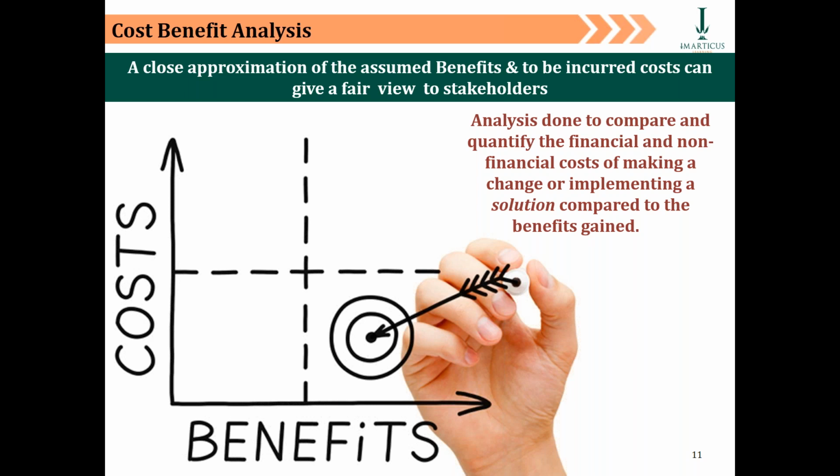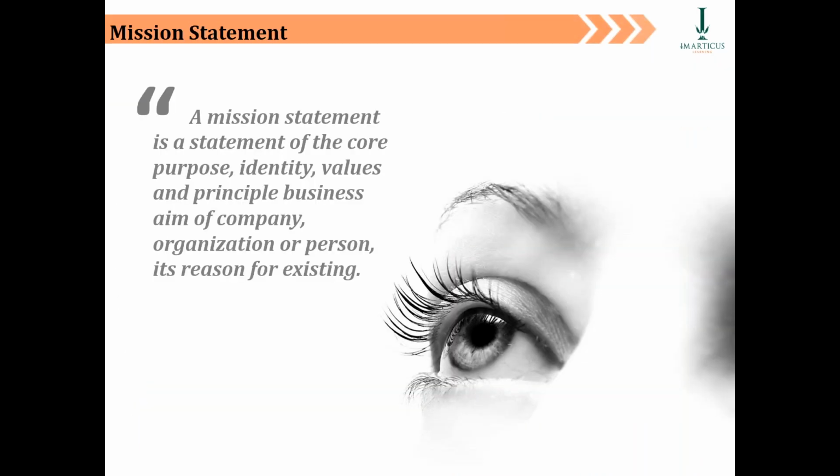So how do you typically generate your business cases? By doing a quantitative and a qualitative business benefit analysis, comparing that with the cost, finding out a break-even period, and then proposing it to your stakeholders. That is how you understand the likelihood of the product brand moving forward, provided the other conditions remain the same. And that is the business value I want to bring out from implementing this project.